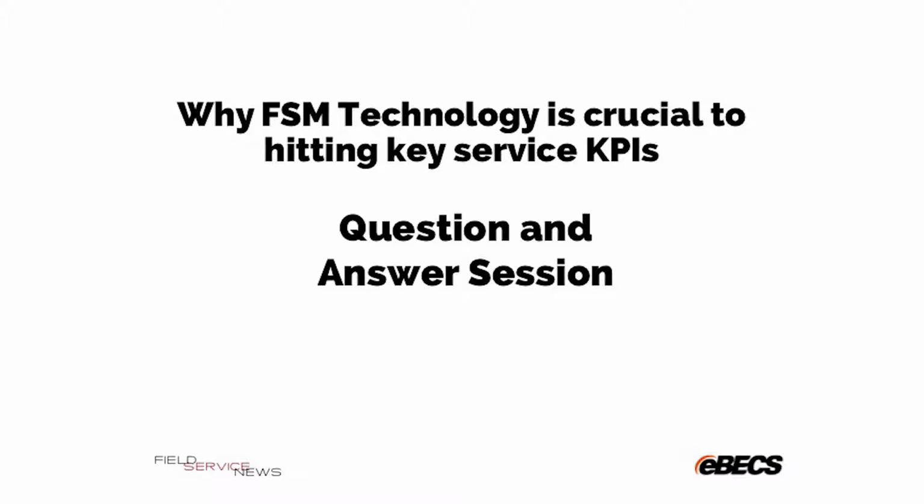Do we determine that it is something that's absolutely critical for go live and therefore a piece of customization work needs to be done, or is it something that doesn't have to be critical for go live, can be put on the back burner on a backlog, and be reviewed in a subsequent phase? And when I talk about phases with customers, often the mindset is this could be months and months between phases. We break our projects down to very small, quick phases of delivery, which have this huge advantage of being able to get the product out of the box, fully supported, in front of the customer, delivering as much of the benefit realization that they want as quickly as possible.